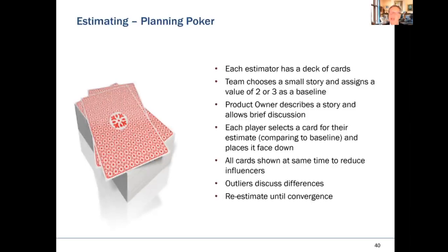But if you still can't agree, you're still at 1 and 13, put the card back in the deck, come to it later, go off and do some research. You are not ready to estimate it yet, okay? That's how planning poker works. Keep it simple, maybe to 2-3 minutes at a maximum. Just move on. Don't spend a lot of time estimating.